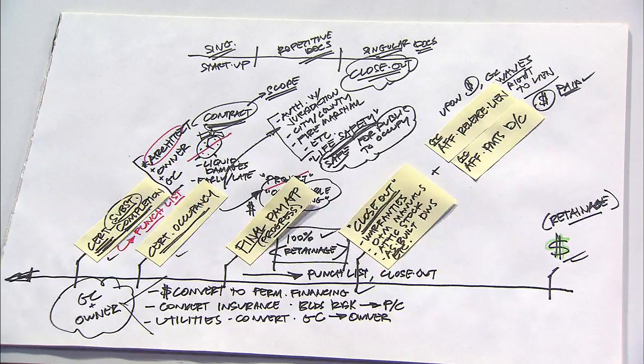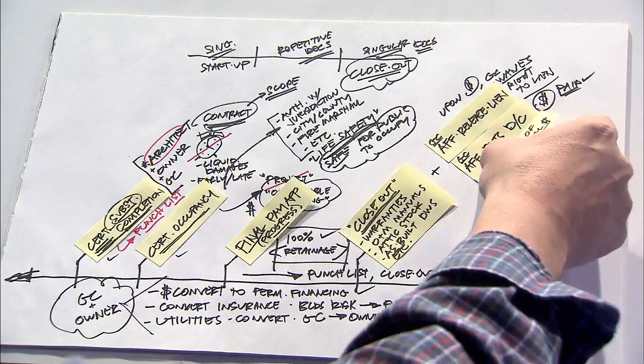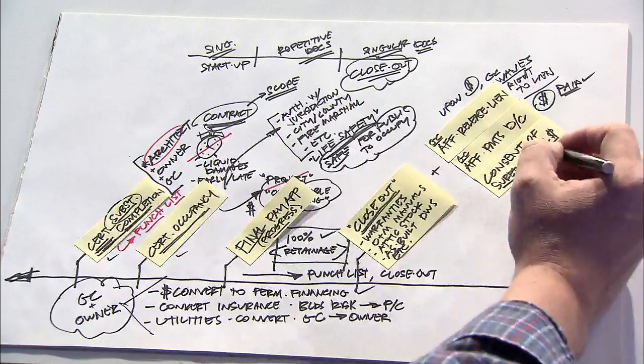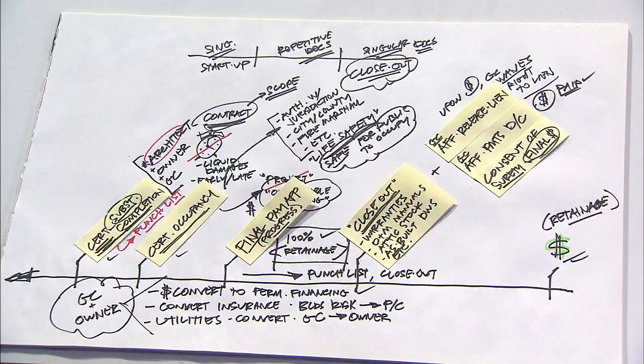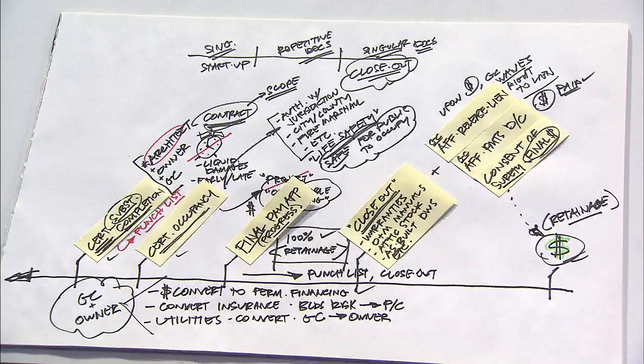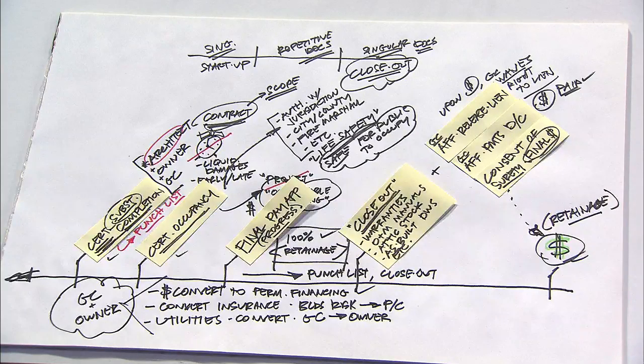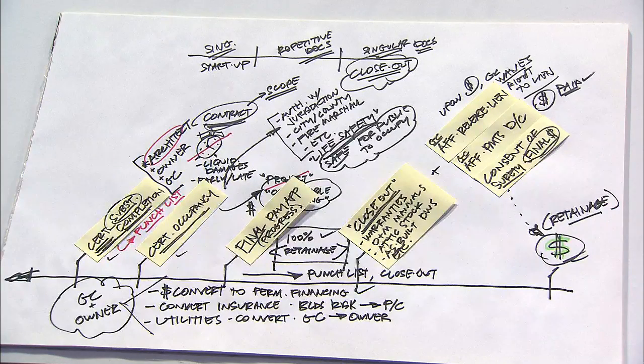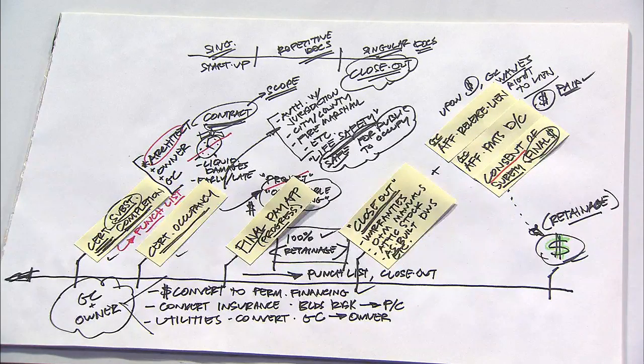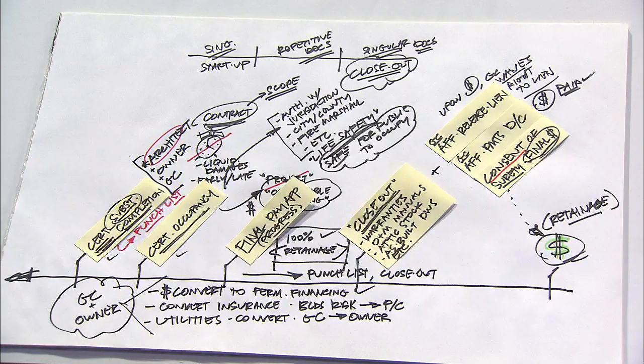Related to the bonding process, the contractor would also submit a document executed by the surety. And that is a consent of surety to final payment. The surety is very interested in knowing when the contractor is about to receive their final dollar. And before the owner will release that dollar, the surety would have to give consent that they acknowledge that the contractor is about to be paid.